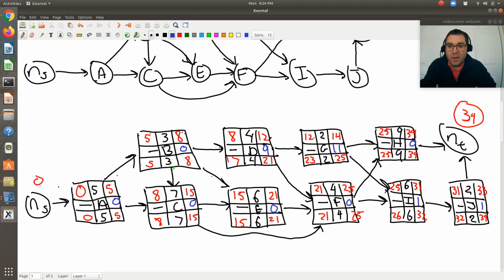Now I want to identify my critical path. Let me try getting something like yellow. I'm going to try and star, if I can see my cursor. This is going to be problematic because I can't see my cursor, so let me go back to blue. I'm going to star all of my critical activities, the activities that have a float of 0, because this tells me there's no flexibility in when they begin or end.